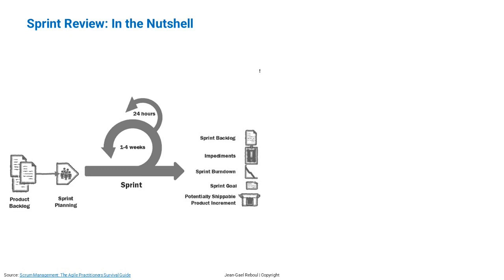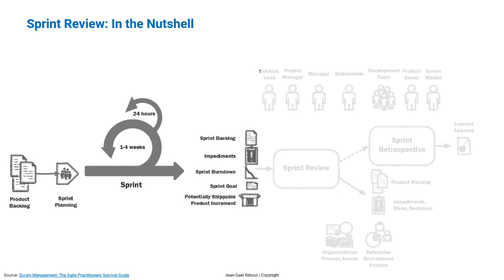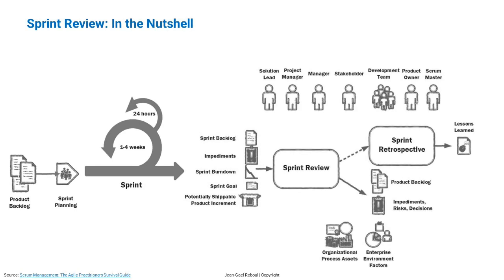The iteration starts. The team meets daily during the stand-up. And, at the end of the sprint, the team has created product increments that can potentially be released to the customer. But as we all know, during the sprint, the team faces challenges, makes decisions and trade-offs. They also update daily their tasks with hours they've worked on, which helps all product stakeholders understand the progress made through the sprint burndown chart. And all these outputs become inputs to the sprint review, which is typically followed by the sprint retrospective.